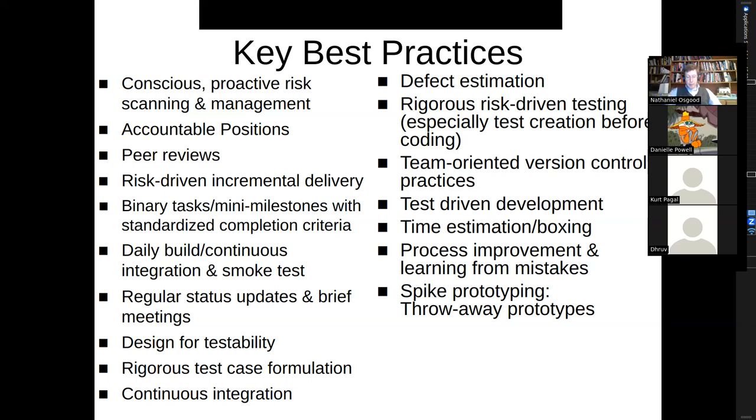Good. I think the notion of a spike prototype is something that's important. These are throwaway prototypes that often focus on particular risks, right? Resolving risks. I think most of the teams made good use of spike prototypes this year. Trying out, seeing how to understand how effective this technology would be in addressing this need in the system, or whether these two technologies work together, play nicely together, et cetera.